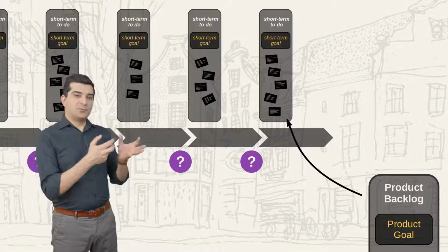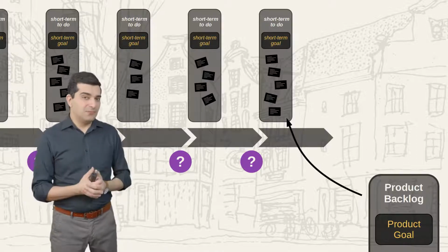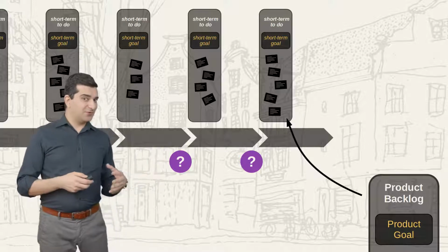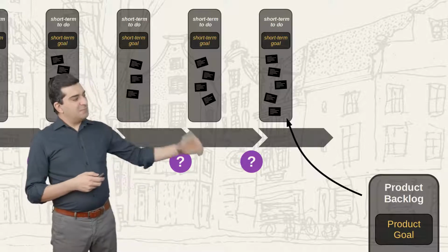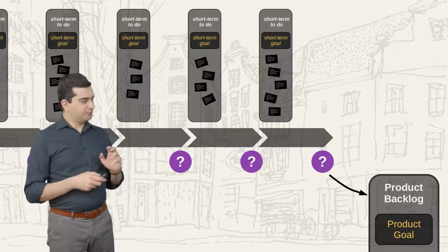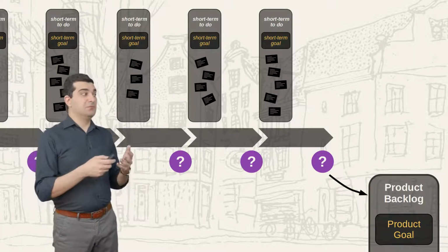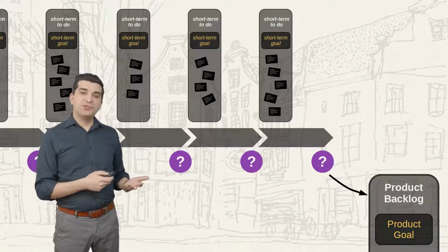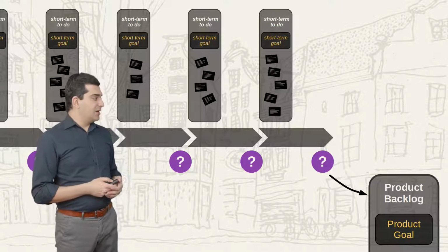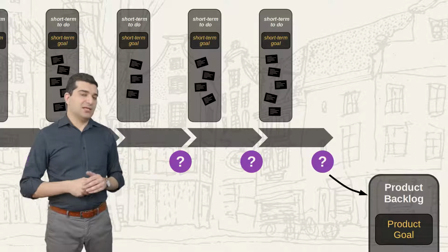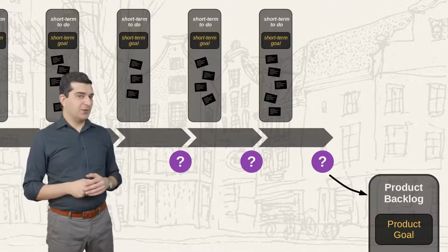We will evaluate the product that we have created and the way we've been working. Based on that, and based on the feedback that we get for all of those things, we will make adjustments to the product backlog. We may add new items. We sometimes remove items. We may make changes to the existing items. We may change the order of them, anything that can happen.